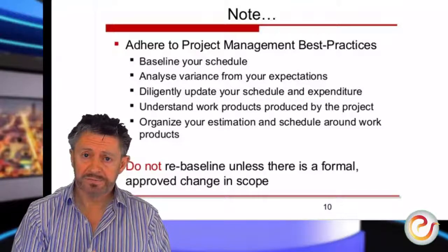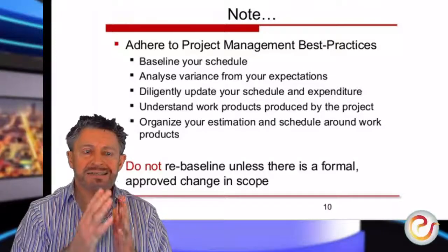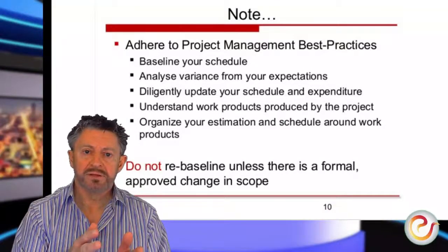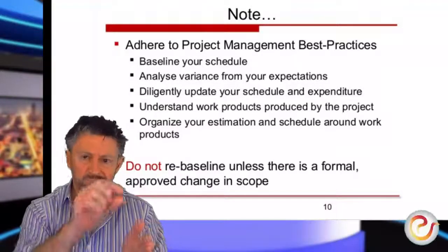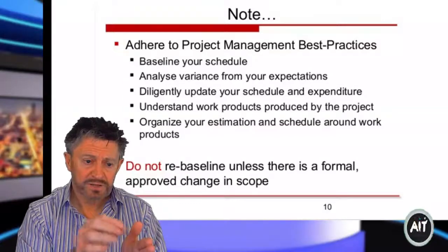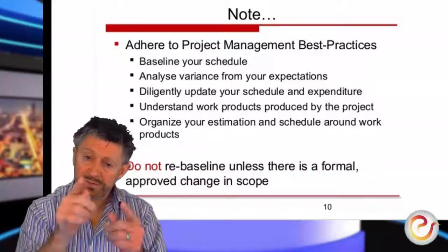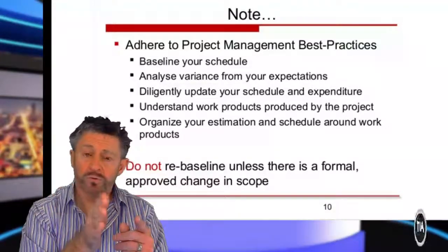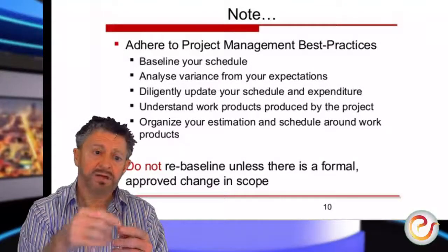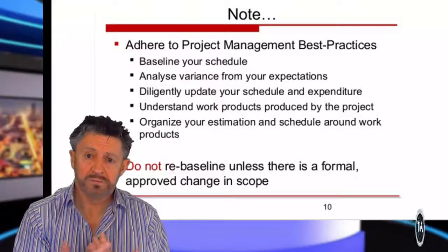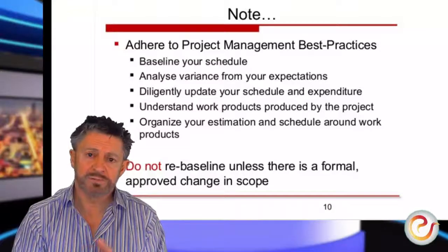There is the other side of it, where you can change your baseline plan and reduce. So the customer might say, I need to get this project out a month earlier. What can we do? And you might say, well, we can remove some of these requirements. We haven't done them yet, therefore we can remove them and reschedule, and that might help you. So you can come in ahead of your original project plan. You can reduce the time taken and the cost by removing objects or deliverables or functionality out of your project plan.